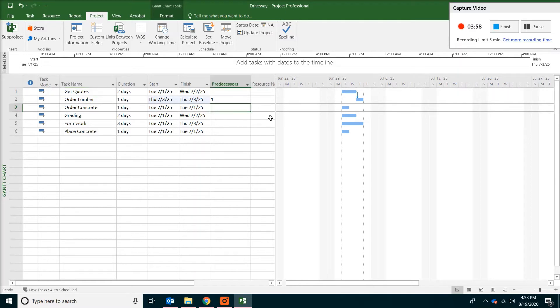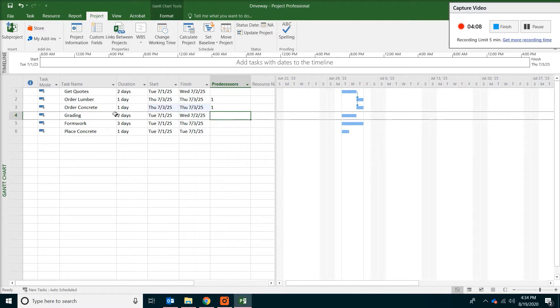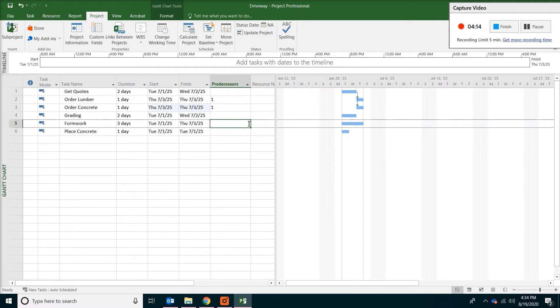The same thing with the concrete. So getting quotes will be happening before ordering the concrete. Grading has nothing to do with the quotes. So we will leave this blank.